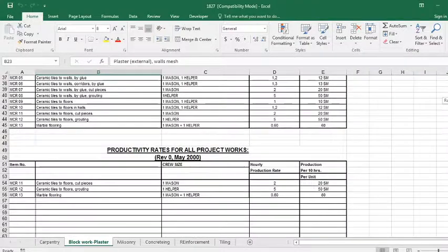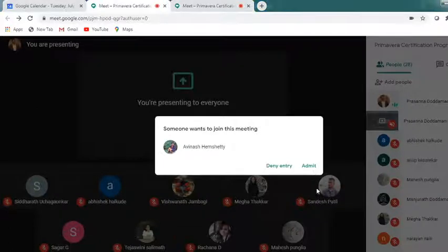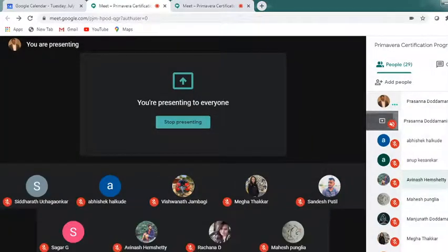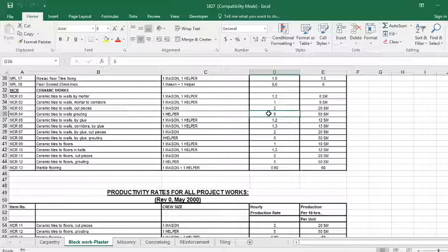So this is only a standard. It does not mean that you will have exactly the same productivity in the execution. No, this is only a reference for the planning. You need to know how much work can be done. This is proven, that we can do so much work per hour. There is no experiment being done in this. If I'm talking about ceramic tiles, wall grounding or gluing walls or anything, I know that this will take so much time. This has been proven. You need not make any changes in it. You need not do any experimenting in it.